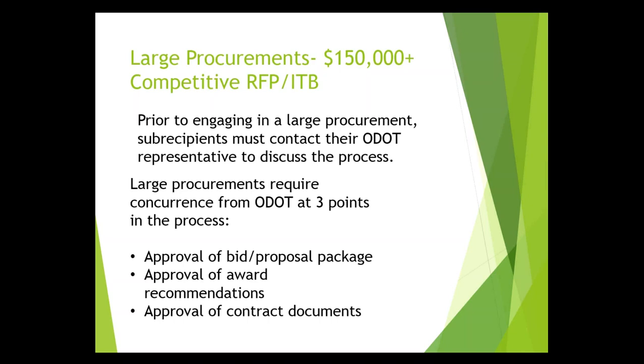First, the approval of your bid and proposal package, approval of your award recommendations, that's the vendor that you want to award the bid to, and approval of your contract documents once that award has been made. The procurement checklist outlines each step in this process, and at this level of procurement, you'll be partnering closely with ODOT Office of Transit compliance staff throughout the process to ensure that we have a compliant process.